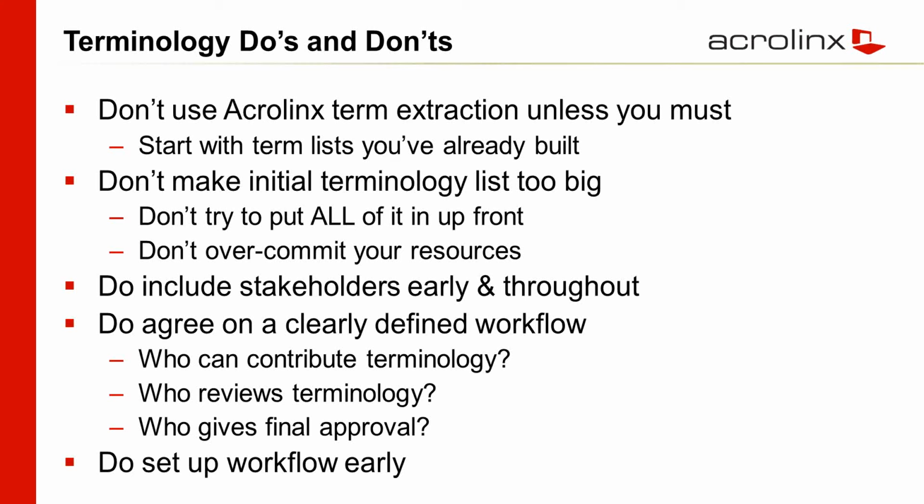Be careful not to make your terminology list that you start with too big. What's too big? You have to decide. It depends on how many people you have to address it. But, you know, a few hundred terms you can deal with. 10,000 terms, that's too much for phase one. Don't try to put all of it in up front. You can phase it in over time. And in particular, you've got to be careful with overcommitting the resources.